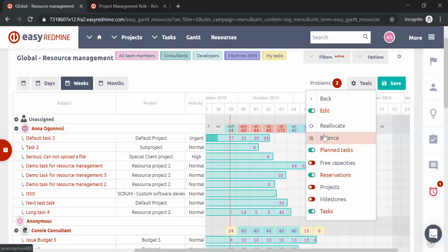And only the last day of the task duration is never balanced, because the remaining hours that could not be allocated into previous days are moved onto this day, which means that on the last day of the task you can be left with actually quite a lot of hours. And also when two or more tasks overlap, their allocated hours from the days that overlap are moved to the last day as well.